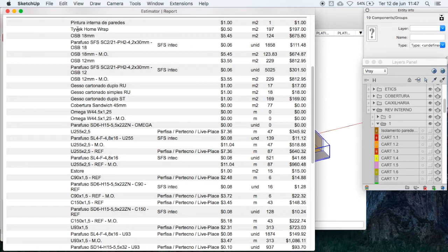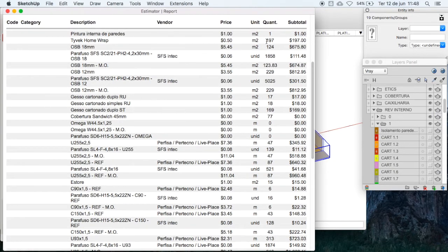We can assign more than one value per material, such as a value for material and another for labor. The amounts present here are the actual quantities and have no margin of waste. This information should also be decided together with the contractor for each type of material. For some materials, the simple quantity is already sufficient to prepare the budget and for the purchase of materials. However, some elements need more information for purchase of materials.